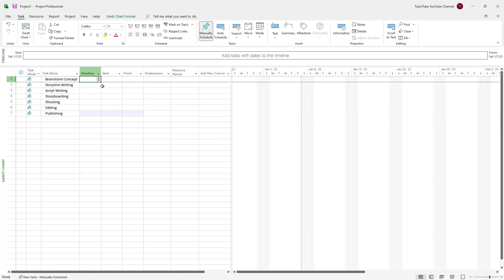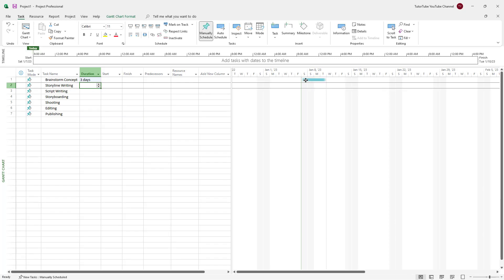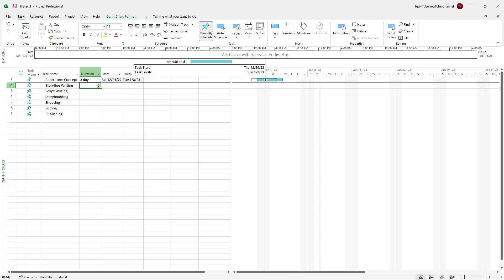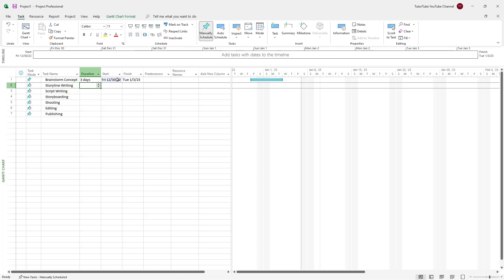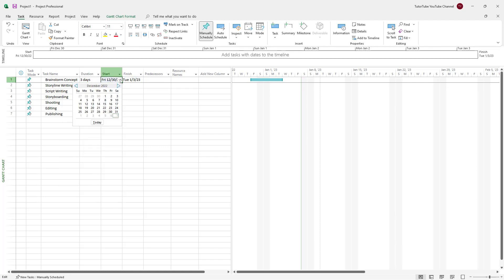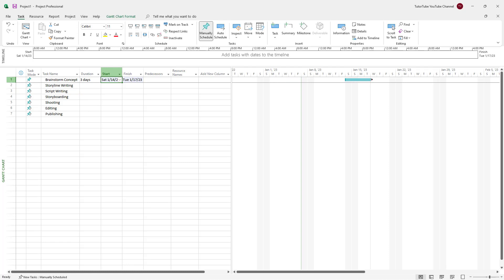Now let's increase the duration for each task. For brainstorming, it is going to be three days, and you can see that the bar pops up on the timeline. You can change the date by clicking and dragging — this denotes when a certain task starts and finishes. You can also select a specific date, like January 14, and everything arranges accordingly.